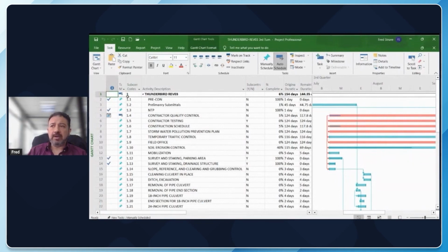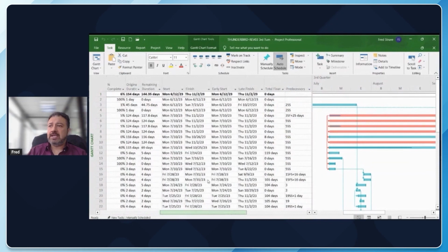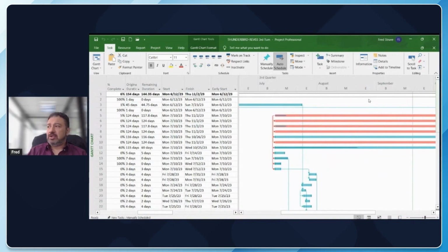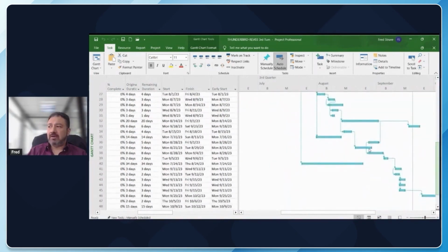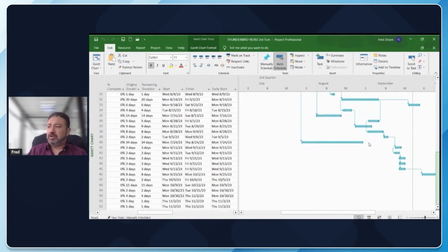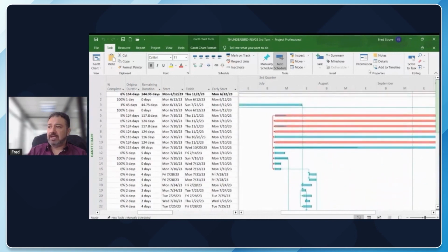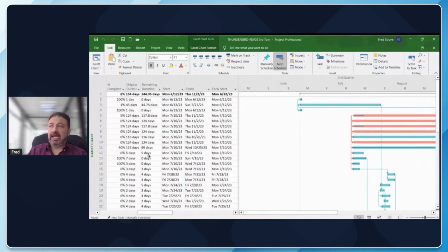I have created subcontractor codes. In this case, I have different levels of percentage complete, and I have highlighted a very specific critical path. As you can see, the dependencies on this project are not always start to finish, but I can make use of different options, and all these levels of complexity can be managed with Project. I also have the ability to use an inspector to find out if there are any inconsistencies if I move things around, but definitely there are some things that can be viewed and organized directly with the menu.